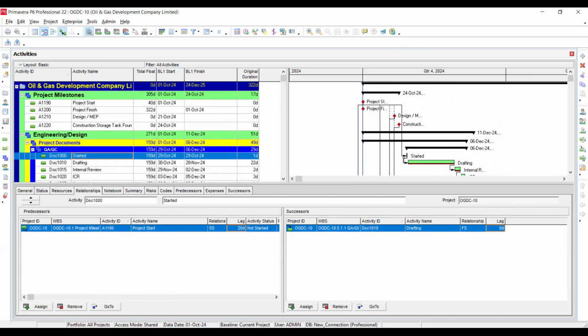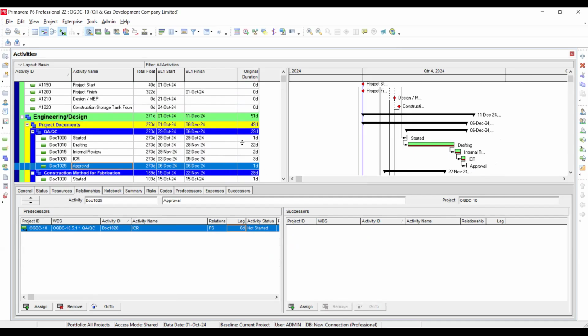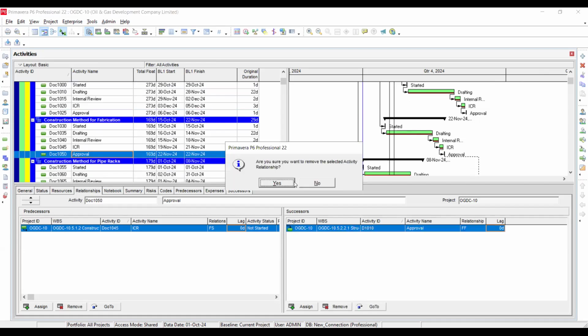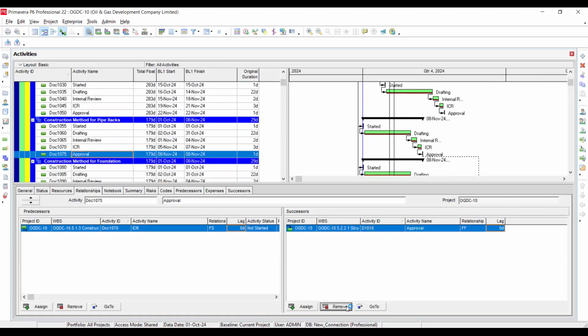Okay. This one, I will make you understand this way. I have to remove this relationship. I have to re-strategize. See, now it is enhanced. And I also need to remove these relationships, because in project scheduling, no activity should be kept open-ended, right?